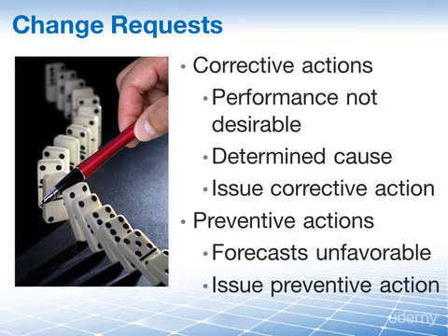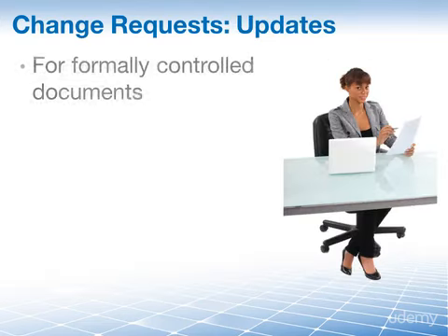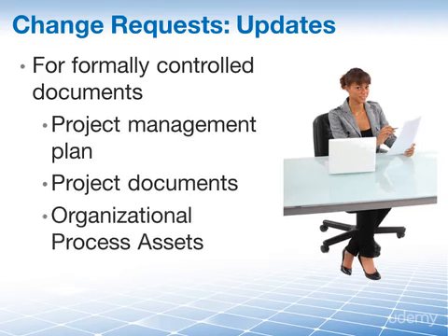But wait, aren't there other types of change requests as well? Yes, indeed. We also issue change requests when we want to update formally controlled documents like the project management plan or project documents or organizational process assets. And if you think back to our last 3 outputs, what were they? They were updates to the project management plan, the project documents, and updates to the organizational process assets.